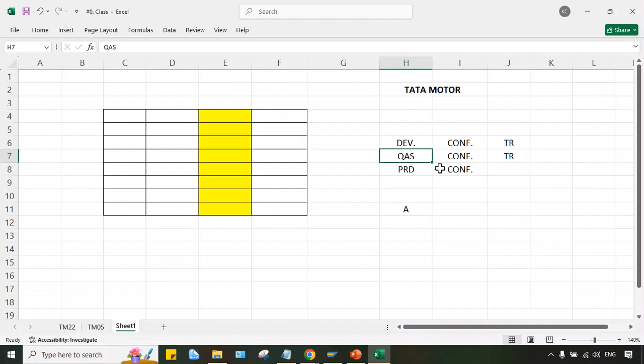It is taking, let's suppose, 2 days. In 2 days we have completed the entire migration. Then we get the idea that within 2 days, or within 3 days, we can complete the entire data migration. So then we have to move for the final cutover, right? And for these 2 or 3 days, we can lock the legacy system.